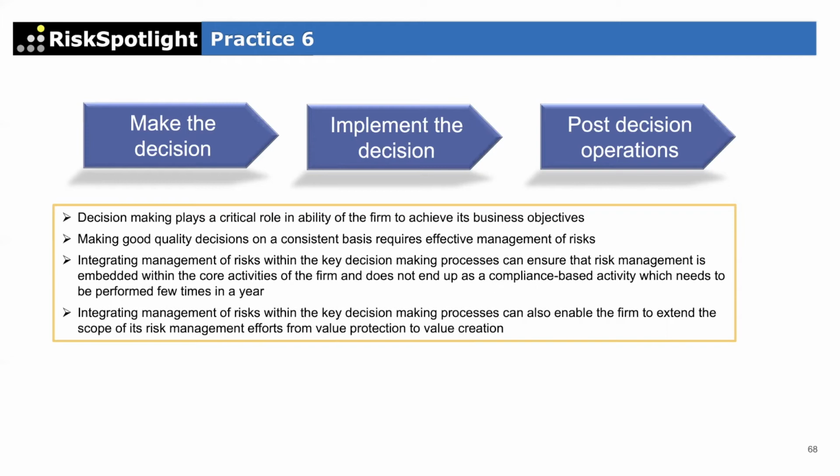So that's why that template is very important. If the decision makers know that in order to get approval for my decision, I need to capture all this information and operational risk is part of that, then they will automatically come and talk to the right people, whether they are the people managing operational risk in the first line, or they may come to the second line to get help. But you want that onus to be on the people who are going to submit that application for getting new budget for whatever they want to do.